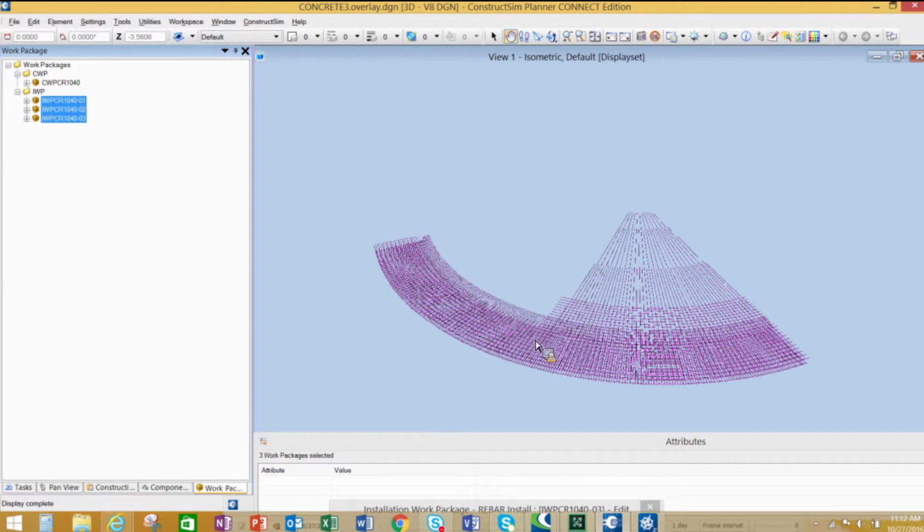Why is this important? Because by being able to do this, we're able to tag that rebar directly to that concrete structure. All right, so you don't have, rebar and anchor bolts. One of the biggest things we have happen in the field is when rebar comes in, we normally buy it in lots. Okay, the rebar gets misused or miscut. If it's already been bent, it may get used somewhere where it's not supposed to get used, and you end up having to buy more rebar.